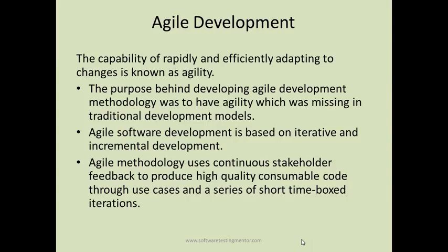If you consider the waterfall development model or the V development model, there were very few chances of agility there, because requirements have to be finalized, design has to be finalized, only then coding starts, then testing. So it was a very rigid approach towards developing software, and that was not good, because if a stakeholder came in and saw the software and thought, no, I don't like that and I want to get this changed, then every process has to be followed again.